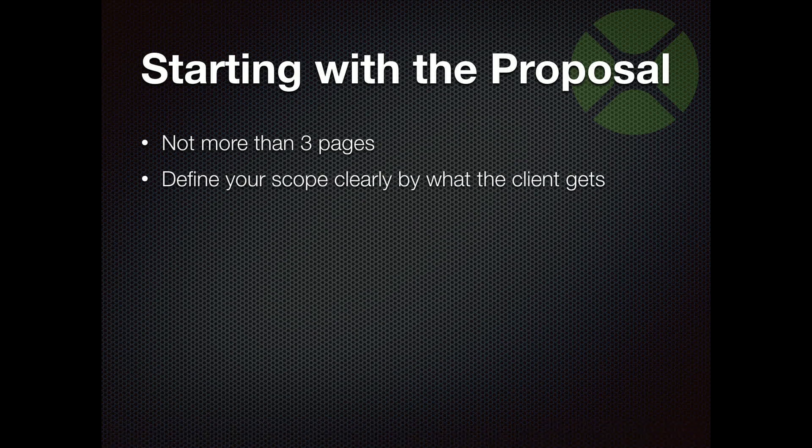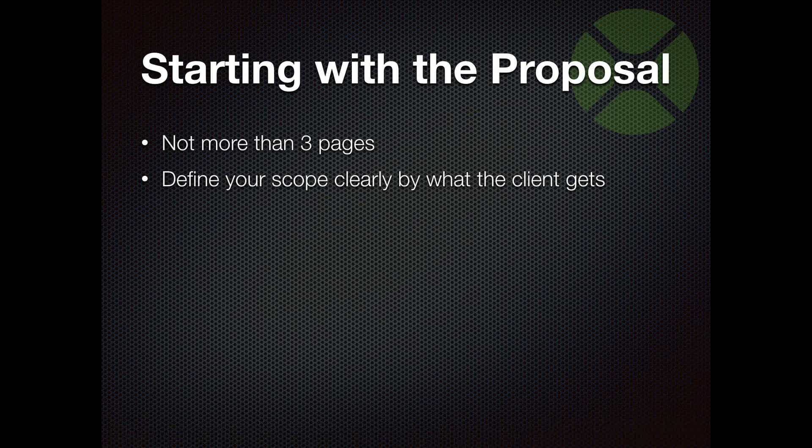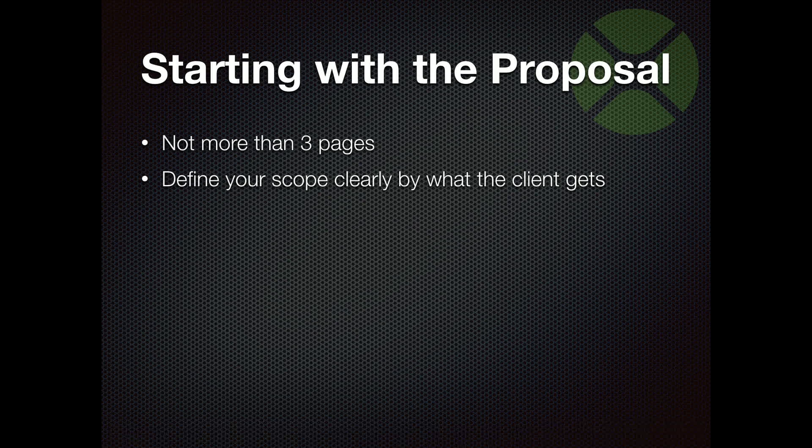You want to define your scope very clearly by what the client gets, not necessarily what you're going to do, but what the client's going to get. So not technical specifications. They don't understand that, and they're not going to read it. And in the end, when you want to go back to something to define the scope, you're not on the same page. So the proposal is setting that stage with your client to start off with everyone understanding what you're getting to. And if you're giving them a bunch of technical stuff, they're lost.